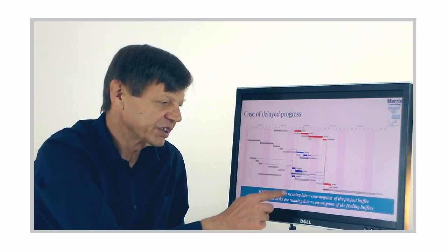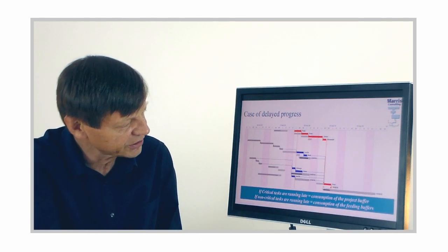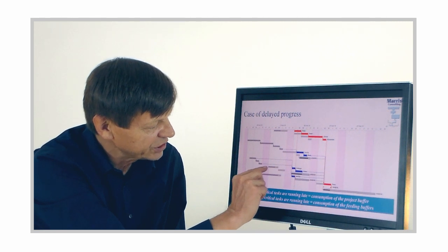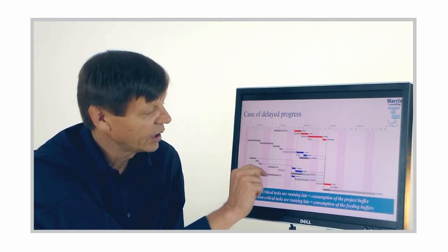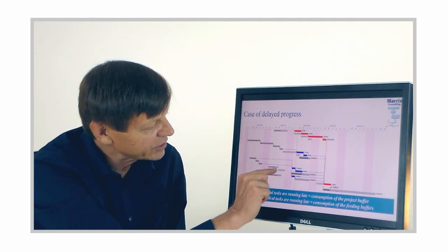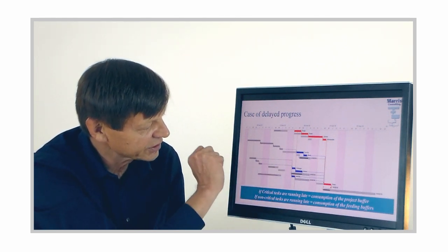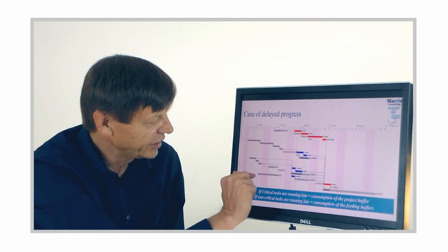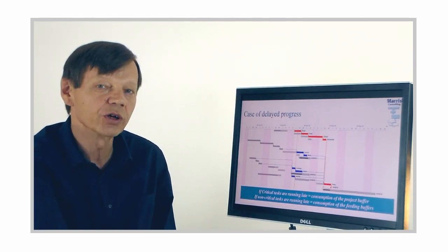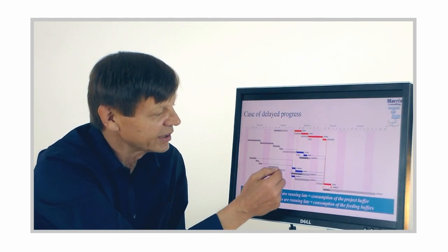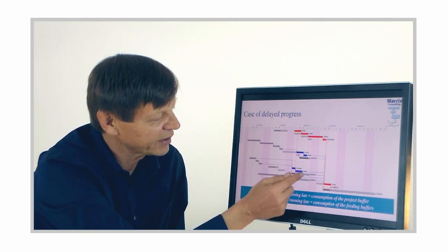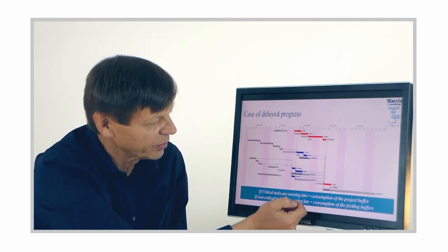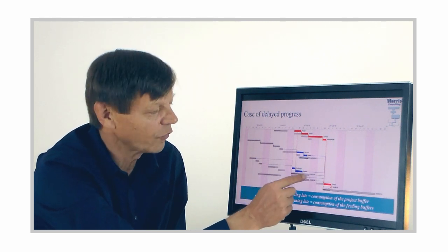If we look at another part of the project here, we had a whole bunch of tasks that needed to be done that were non-critical. Okay, Solange was meant to do this task here, and she hasn't quite finished. She's still got a day of work to do. Because she hasn't finished that task, Adam, who had to take on the next task, couldn't start, so he's completely overdue. And Cecilia, that was doing something else, is nearly finished, but she's still got 1 day of work to do. Okay, so what hasn't been done yet needs to be done, and so we put that back into the future. Okay, and then we calculate what that means in terms of an impact on the buffer, and we find that it's consumed that much of the buffer here.